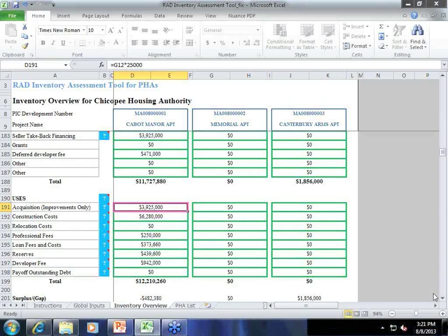Basically, on the acquisition part, you're not going to go ahead and get an MII appraisal, because we know from the prior question that you'll probably end up having to pay for it twice if you get it yourself. So you probably know some appraisers in your community, and you're just going to say, gee, if I have this property and it was not subject to any HUD restrictions, what rents do you think I could get? And then based on that, they'll be able to give you an estimate of about how much the project would appraise for.